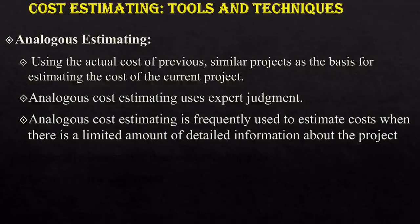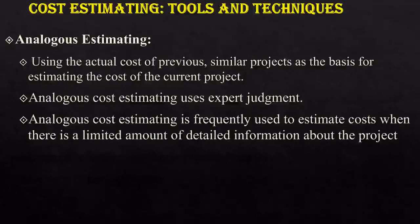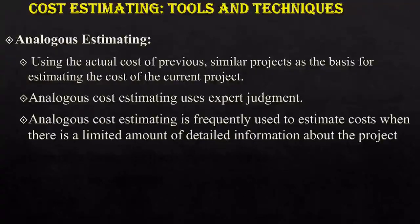Analogous cost estimating is frequently used to estimate costs when there is a limited amount of detailed information about the project. Normally we go for detailed project estimation, but if any detailed information is missing, you can go for analogous cost estimating. Analogous cost estimating means estimating from past experience.